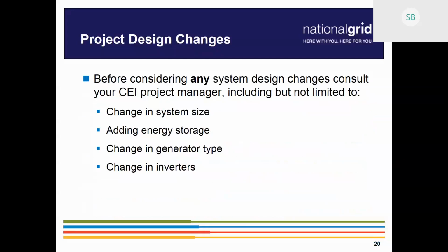And so you can make a few changes during the process. During the design process, you can change the size of the project. You can add energy storage, change a generator, change inverters. But again, the method by which you can do that is really dependent on the type of project you have and where you are in the process. Sometimes it requires a restudy, but really it's something that you should talk to your project manager about if you have any questions or would like to change anything about the project.